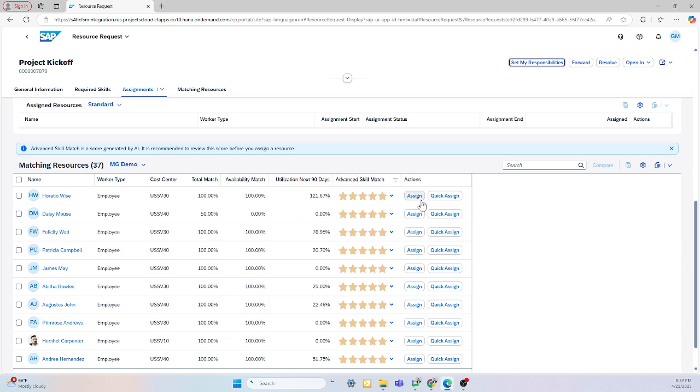If I needed to assign them, and this project was in planning phase, I can click assign. This would update their capacity in the utilization screen. If they needed to start tomorrow, for example, I can quick assign them, and that automatically makes their time billable the way they're set up in the project.